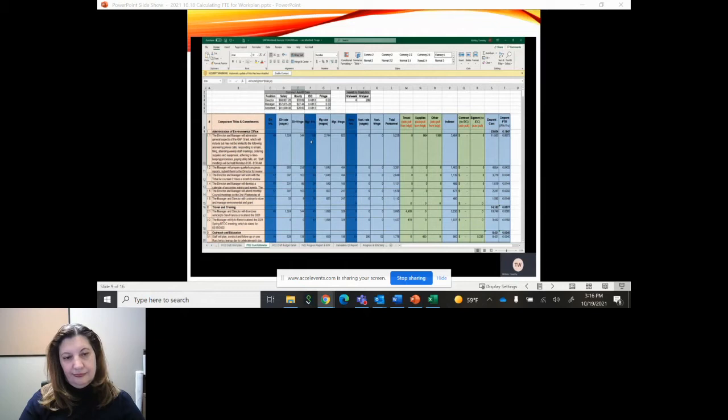And you repeat that process for the manager and the assistant, which brings us to, again, all of these things in light blue, that's free. You don't have to enter that data. That stuff is calculated for you. So that brings us to this total personnel column right here, and that's just real simple. For commitment 1.1, it's simply the director wages and the director fringe, the manager wages and the manager fringe.